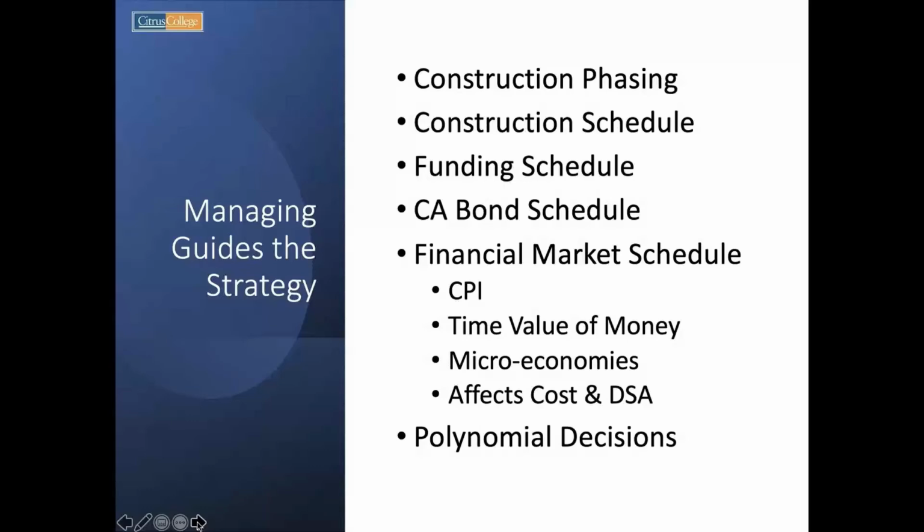Construction schedule, how are you going to lay down your buildings if you're competing for a funding stream from the state? You have a specific construction schedule. You can only get 1 funded per year. So even if you were the best designer and best builder in the world, there's no way that you could build and design one of those buildings in a year. So you're probably looking at least 2 years in between each project. So construction schedule gets penciled out. That ties in directly to the funding schedule.